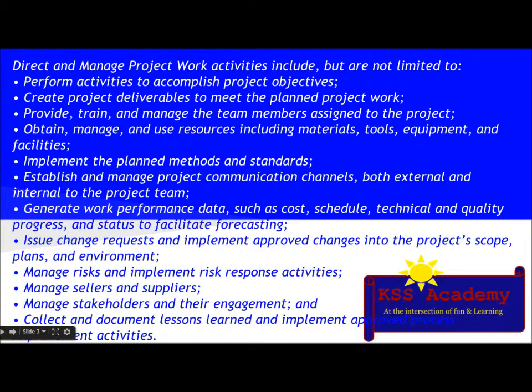Direct and manage project work activities include perform activities to accomplish project objectives, create project deliverables to meet the planned project work, provide, train, and manage the team members assigned to the project, obtain, manage, and use resources including material, tools, equipment, and facilities, implement the planned methods and standards, establish and manage project communication channels, both external and internal